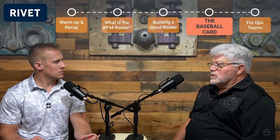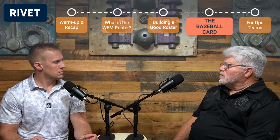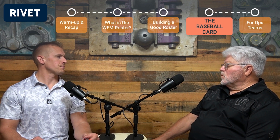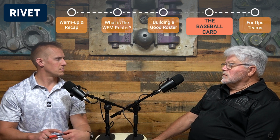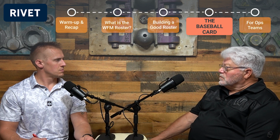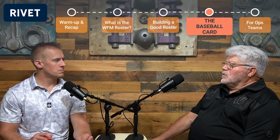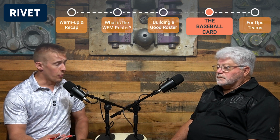And one thing that happens in the industry, particularly with apprentices, is their wage rates are changing every 6 months as they advance through the programs. And with the integration with the individuals, when that happens, their job title and their wages automatically increase, which is important when you're tracking your composite wage rate on any particular project. And your projections get way more accurate too.